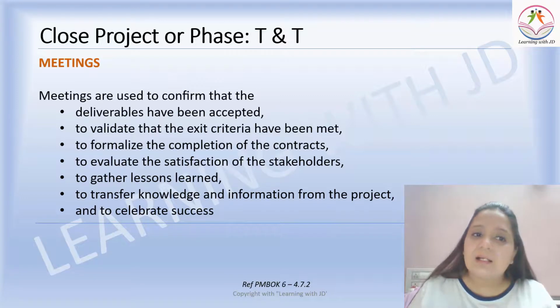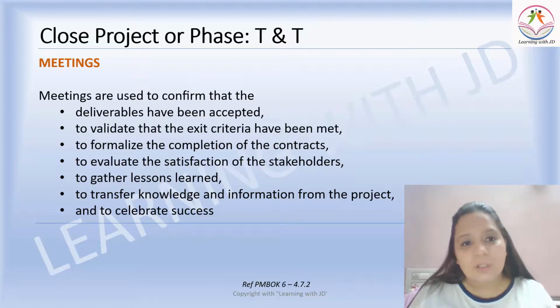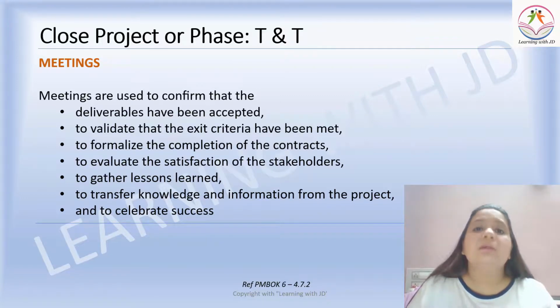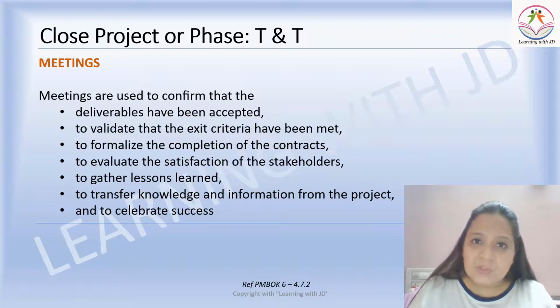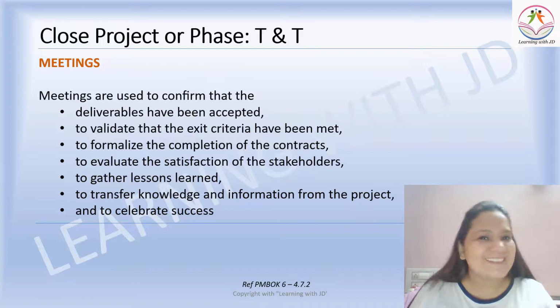Then you may also use meetings as a tool and technique for closing your project or phase. Meetings are used to ensure that the deliverables are accepted, that the exit criteria have been validated and met, to formalize the completion of the contracts, to evaluate the satisfaction of the stakeholders, to gather lessons learned, to transfer the knowledge and to celebrate the success.